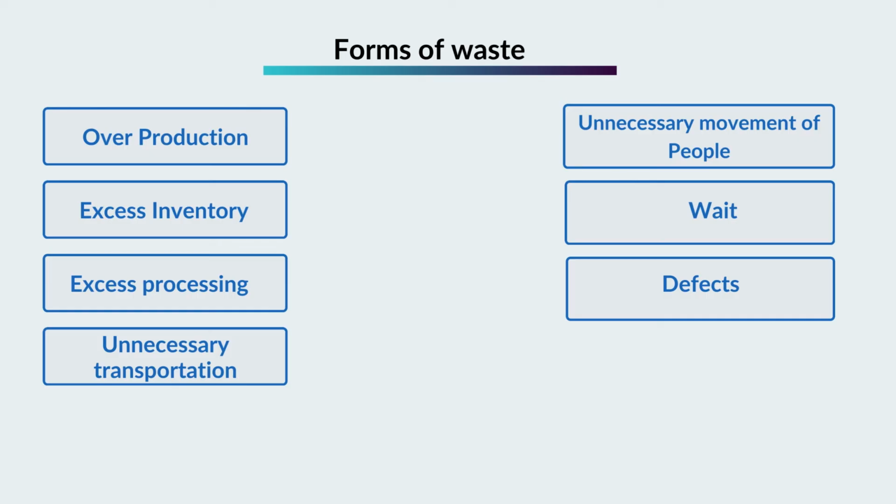Wait. The tasks which are not moving due to any logistic reasons are the waiting waste. For example, waiting for design approval from executives. Defects. The defects need to be reworked on the same backlog, which leads to the wastage of the team effort.